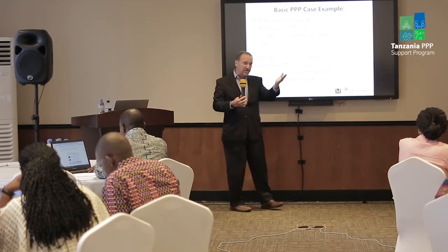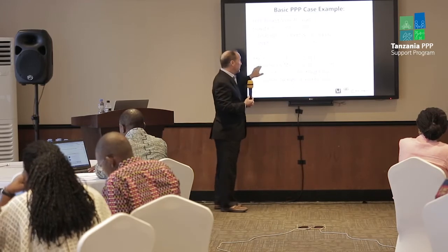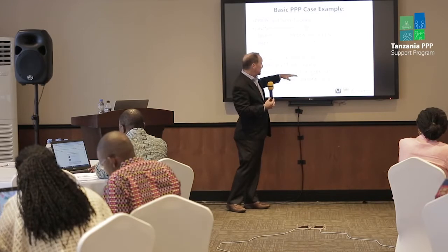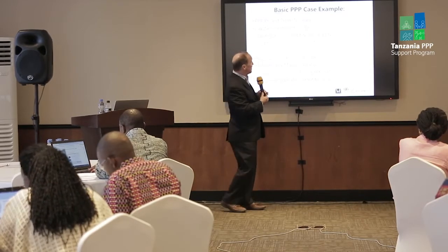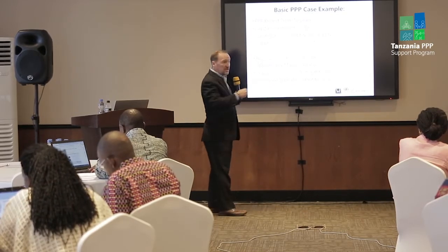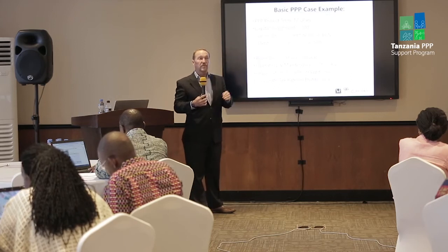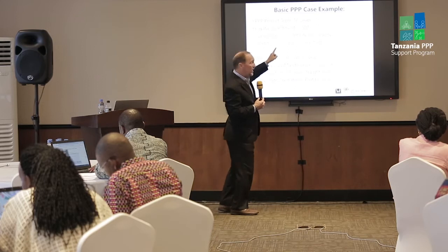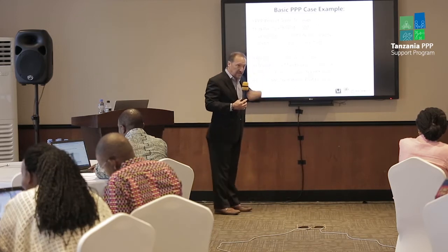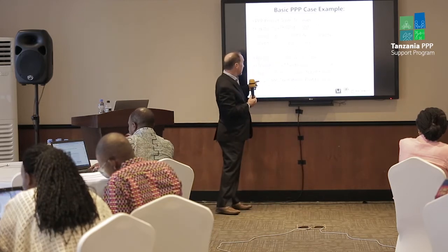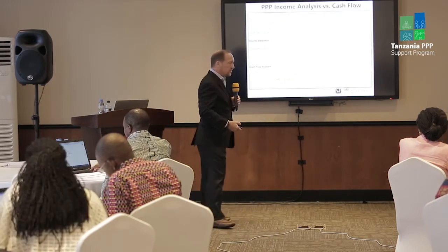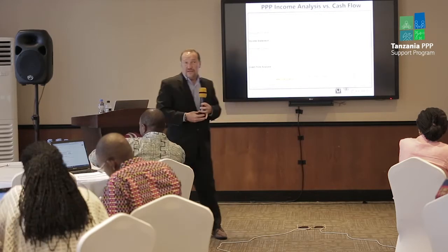We're going to make simplified assumptions here. They're fixed for 10 years. Depreciation, we've covered that one. We're going to use 10-year straight line depreciation. So that's going to mean that of our $100 million initial investment, we'll make a simplified assumption here that every year we will recognize 1/10 of that, or $10 million, as a depreciation expense, and then we've also got a corporate tax rate. Let's see what this model looks like.